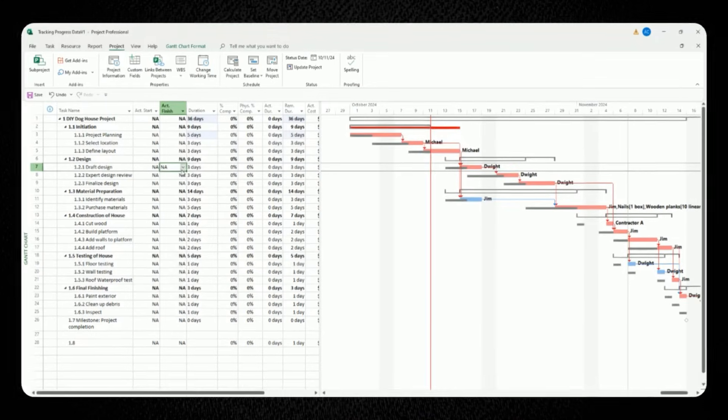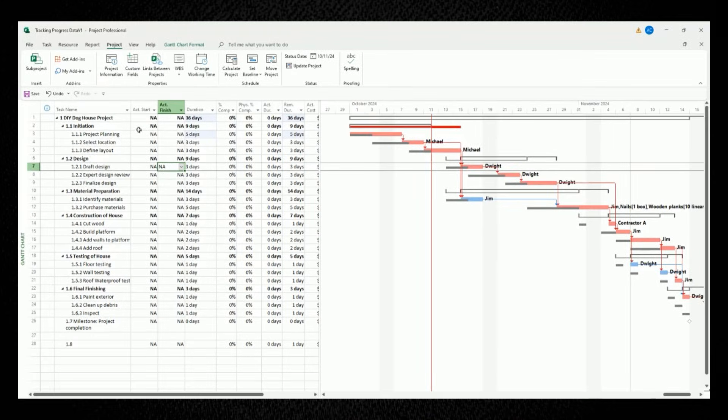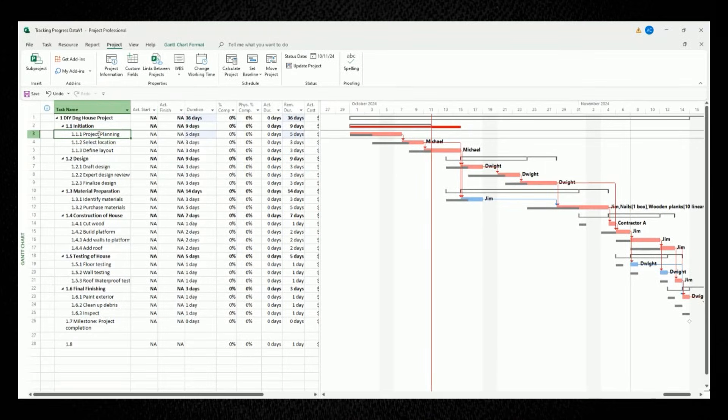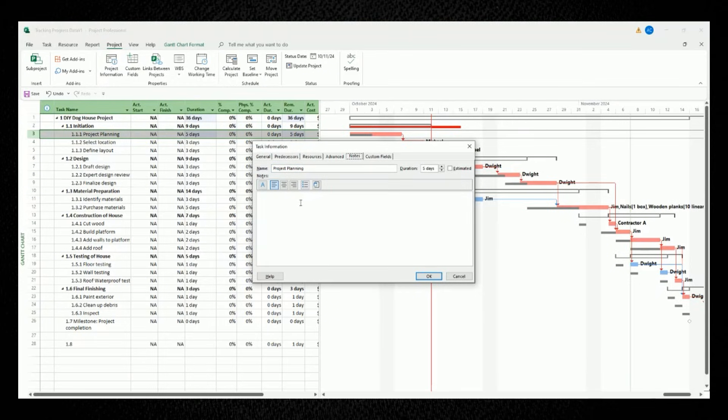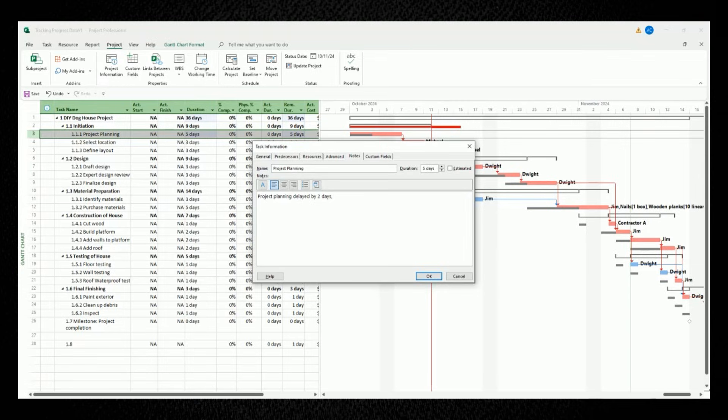Since this task has been delayed, I recommend as best practice to include a note for this task to document the rationale for why a task needs additional time. To do that, double-click on the task name for project planning, and you should see this new dialogue window appear for task information. Select a tab for notes, and it's here where we can enter in any information that's related to the task and what caused it to be delayed.